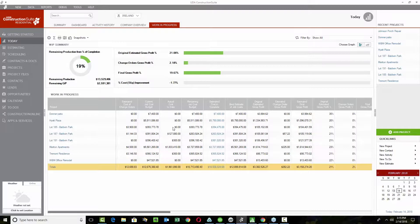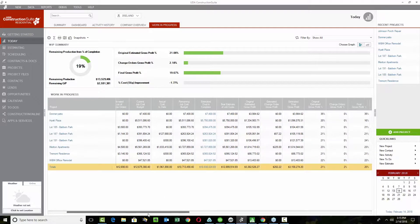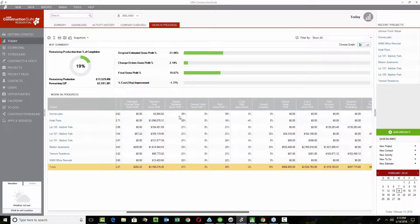The WIP report gives you a breakdown of the original estimated cost for the job, your current job cost budget, how much you've spent to date, how much is left to spend, and whether that meets your estimated cost to complete. As you move across the WIP report, you'll notice we start to track profitability on these jobs. We track things like slippage or grippageness — essentially how close we are to our target estimate. If you're hitting plus or minus 2%, I'd say you're doing a great job.